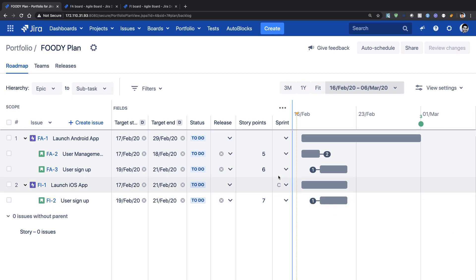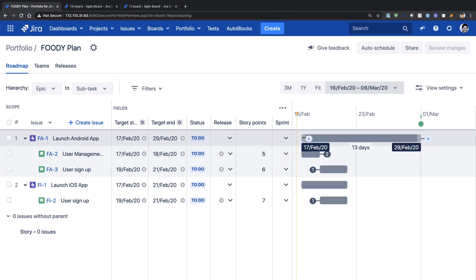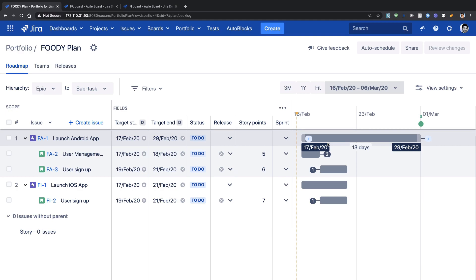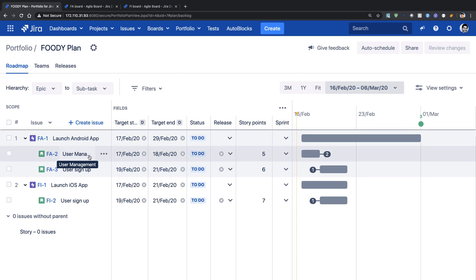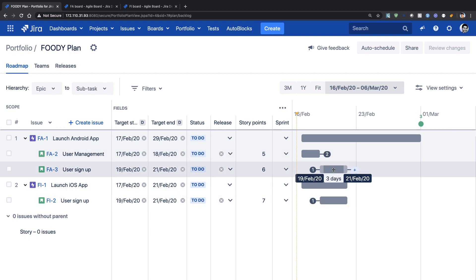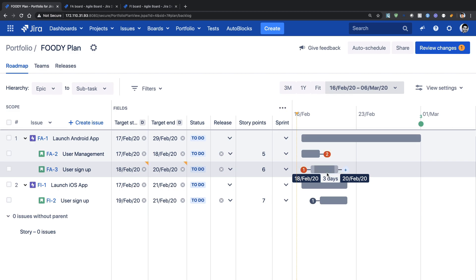I also have a similar board for Android where I have some stories like user management and user signup along with some story points. If you take a look at the portfolio plan right now, we actually scheduled the plan's start date and end date manually, and right now we don't really have any concept of sprints assigned to these stories. We have a roadmap, and the good thing is we have dependencies — for example, for user signup to finish, we need to have user management completed first.